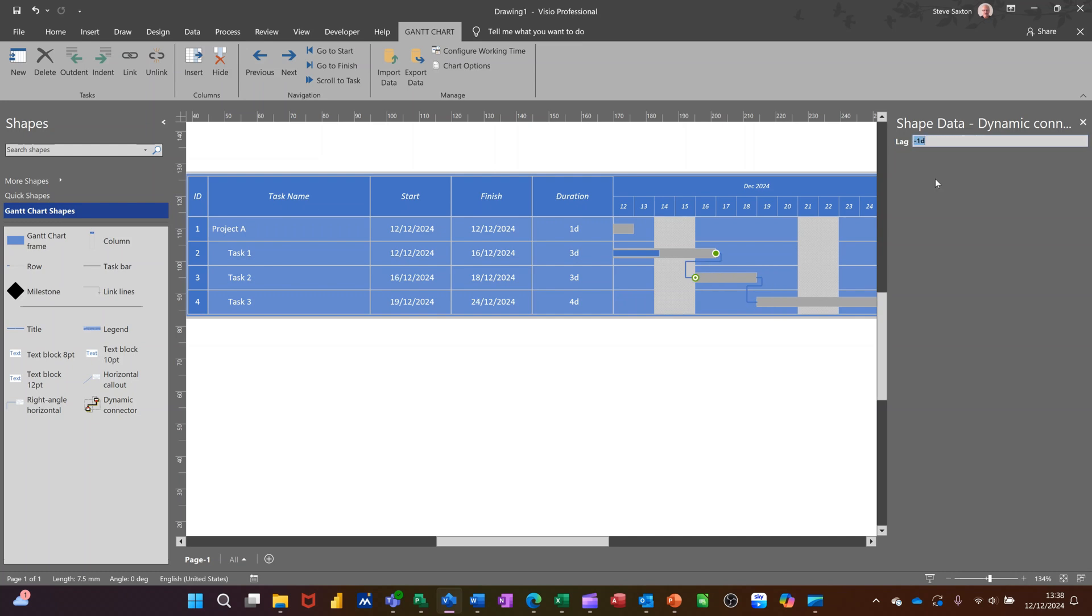I'll press enter on that. See, that's pulled that task back. So that's like it's coming back. It's lead. A minus number is lead. If I put plus two there, two days, that would be lag. There'd be a gap. So that's how that works.